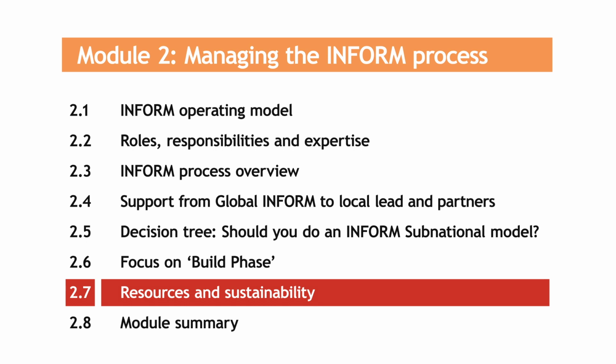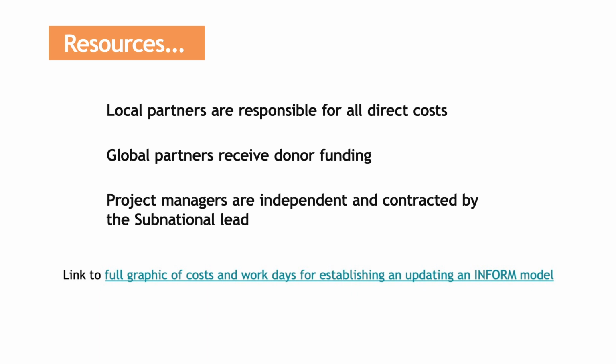Now let's discuss resources and sustainability. Local partners are responsible for all direct costs associated with the model. INFORM global partners receive donor funding to cover costs for their work, as well as the maintenance of the INFORM web platforms. The project manager pool consists of independent contractors and humanitarian consulting firm professionals. The subnational lead contracts directly with the project manager and works under an informal exchange of letters agreement with INFORM global partners and the technical lead.